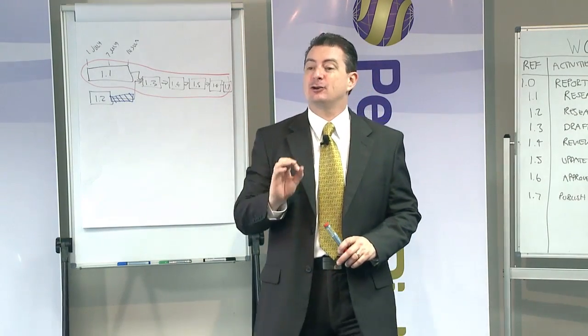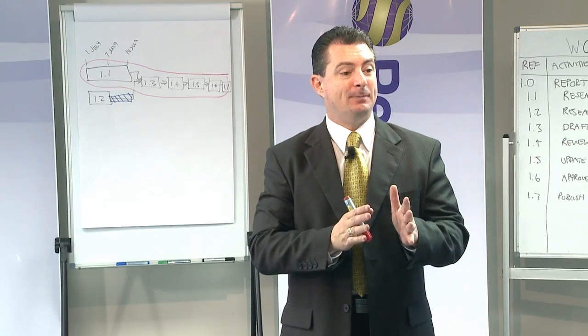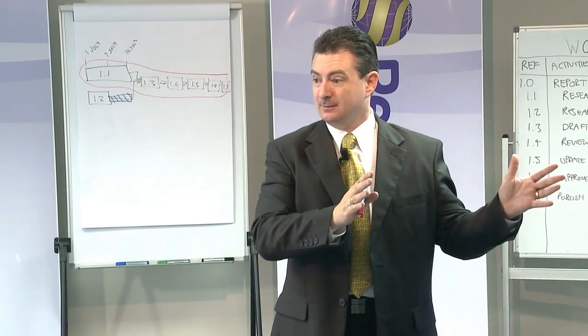The shortest amount of time where tasks are finished to start relationship where there's no float. Now the reason why critical path is so important, because here's the rule. Anything late on the critical path equals project late.